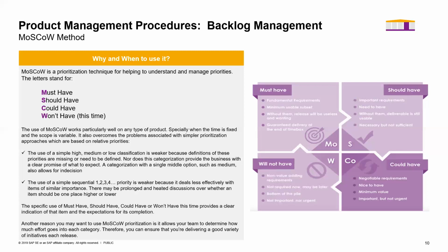One of the key concepts for product ownership is clearly knowing at the beginning which things do not provide value. The product owner and product management team are like the guardian, as I said, stopping those at the beginning. So the won't-haves are already removed from the backlog. The must-haves are put at the top, while the should-haves and could-haves can be part of the backlog, supporting future development.